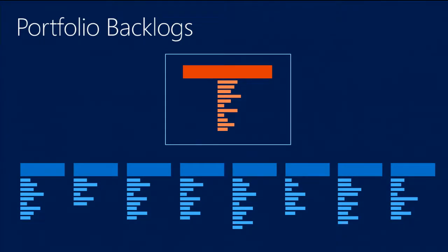But I think of it as a grouping of a set of stories. It's some end-to-end set of functionality that a customer can complete with your product. Usually it's made up of 3 to 8 user stories. Internally, we call these experiences, and I will share with you that as well. The word that we used internally in our process template is called an experience.